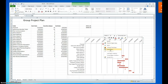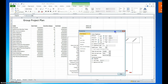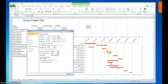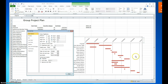I'll go into Format Axis, where we have minimum and maximum set to Fixed. I'm going to change the fixed minimum number to 4930 — just to create a little bit of a gap before the first task. You'll notice that moves the data over appropriately. For the maximum I'm going to set that to 4990 to give a better rendering of what our date range is supposed to be. Now we have a full range displayed.